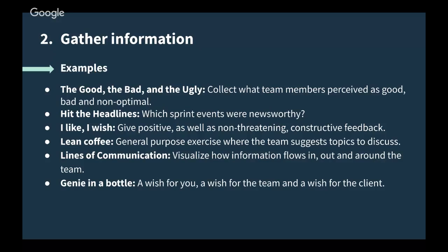in the previous sprint. And with that, you can get an idea of what you need to keep, things that were good, what went bad, and there you have the problems that you should discuss later, and not optimal, also things that are not quite great and you should improve, and also that's a source of problems to talk about later.